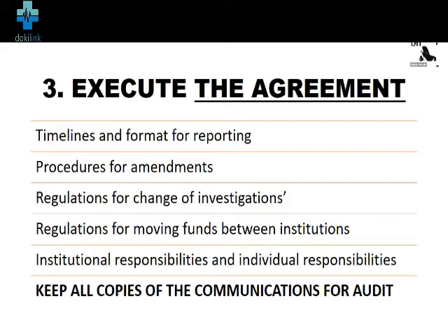So if you need to make any changes, for example, God forbid, one of the investigators passes on, what happens? There are laid down rules written down in the agreement that you have to follow. And for each agreement, as a researcher, you have your responsibilities, and your institution also has its responsibilities towards ensuring that the grant is properly managed.